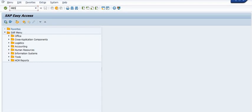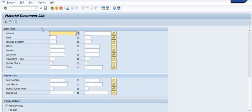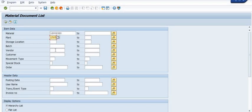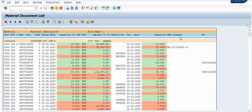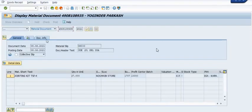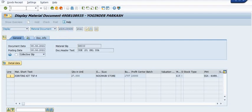To resolve this, go to MB51. Fill in the material, plant 1707, and try to get the records for that WBS. You will see 27 units of quantity reflected. We have already posted a transfer posting using movement type 415.